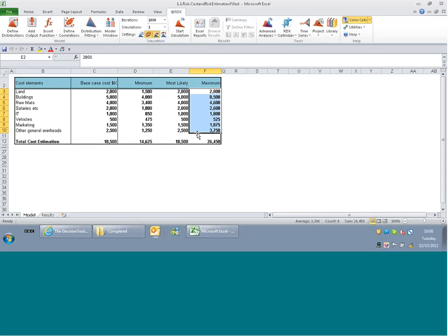So this has now given us some level of variation in our costs, where we have this whole range of different values or possibilities. Instead of costing 18.5 million, now we're saying that our project is going to cost anywhere between 14.6 and 26.5 million, say. So now all of a sudden we've got a number of different values rather than a single value, but there are still some problems which are endemic in this particular type of approach.